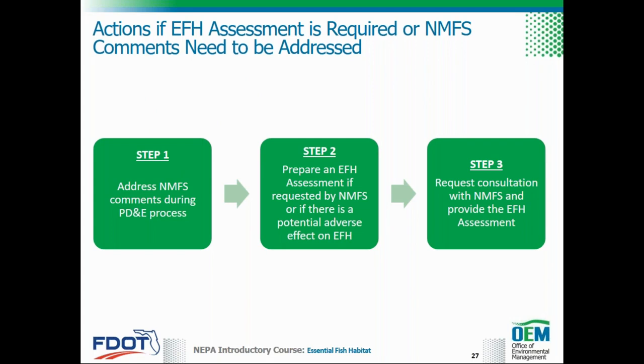1. Address NMFS comments through the PD&E process. 2. Prepare an EFH assessment if requested by NMFS or if a potential adverse effect on EFH is anticipated. And 3. Request consultation with NMFS and provide the EFH assessment.